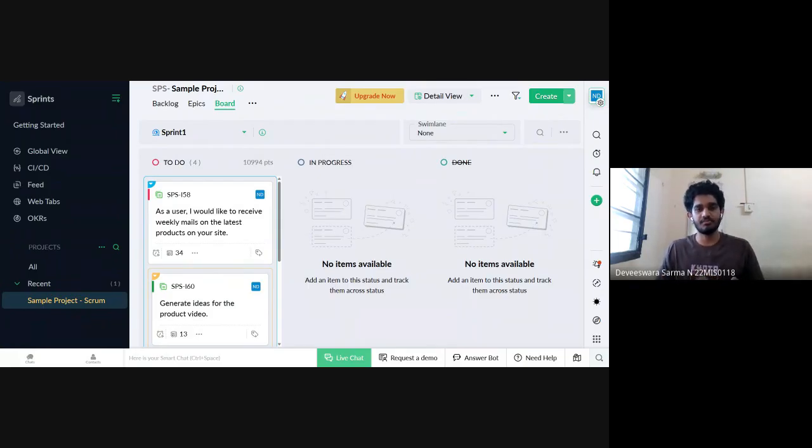If we plan the sprint for 2 weeks and it is Monday, it starts with a daily stand-up meeting. Let's say I am a developer and I have a team, and the entire team participates in the daily stand-up meeting. In it, we discuss what we did yesterday, what the plan is for today, and whether there are any issues we faced in yesterday's development. So today I will say that I'm going to work on this feature.